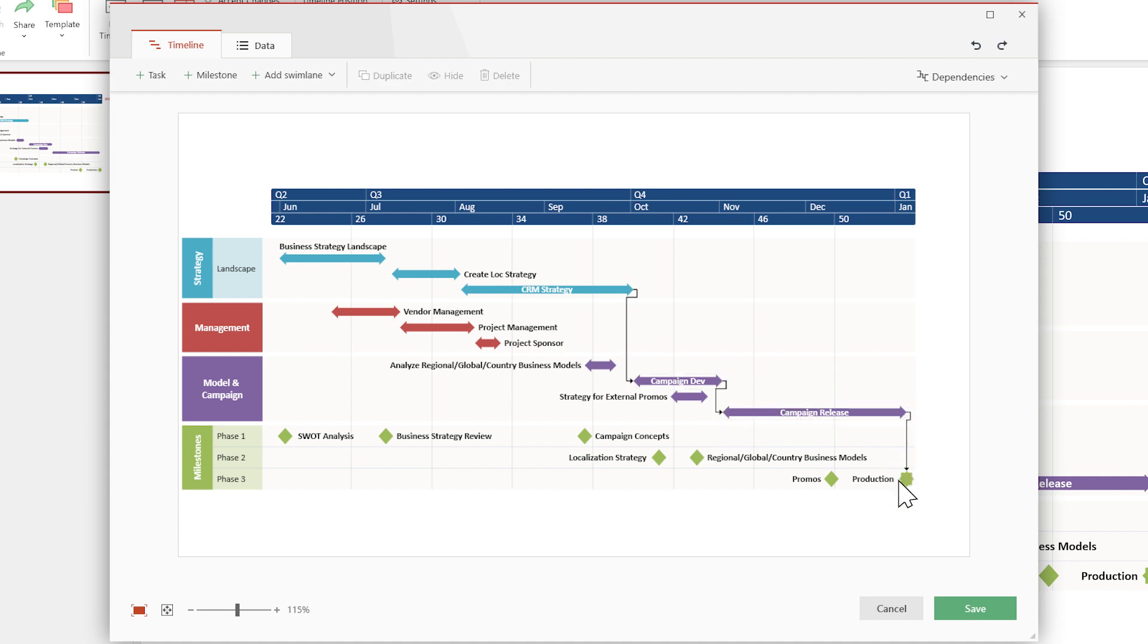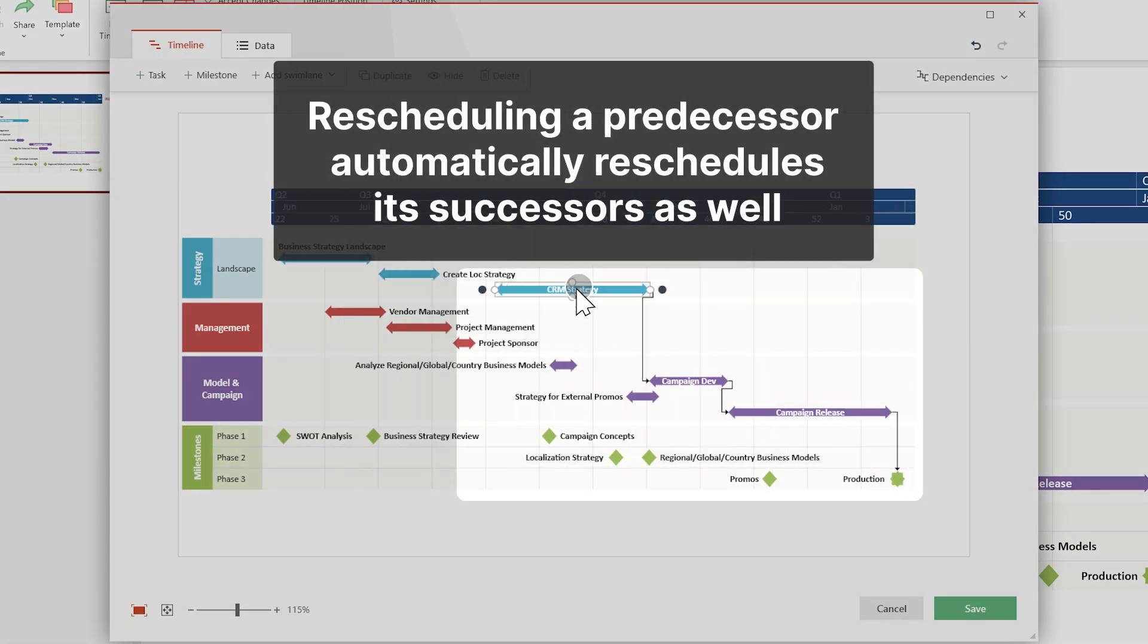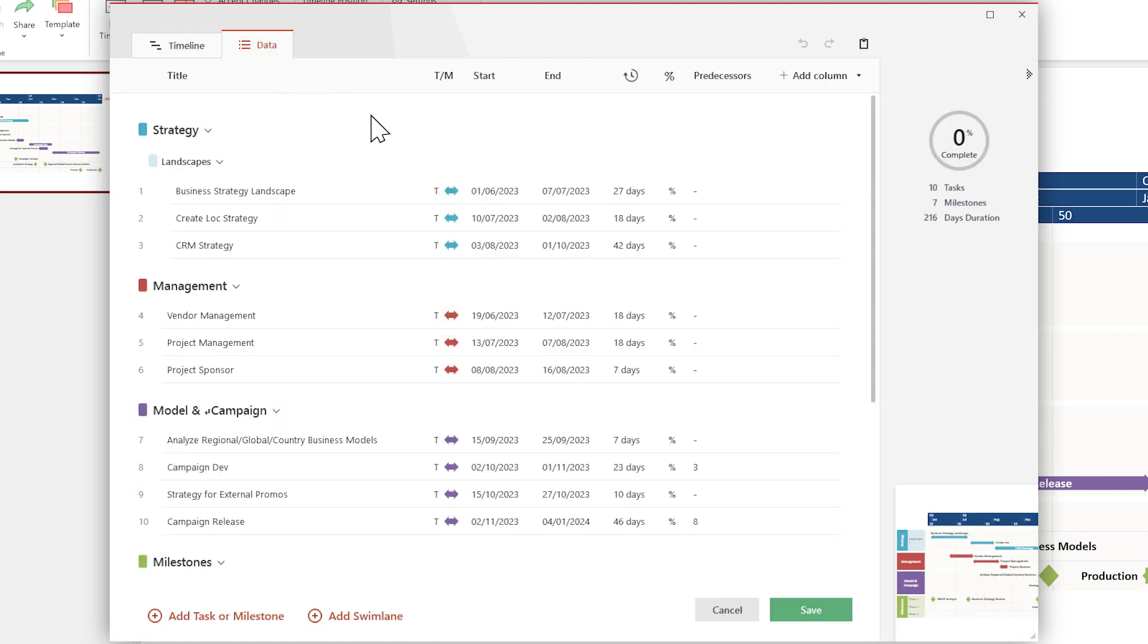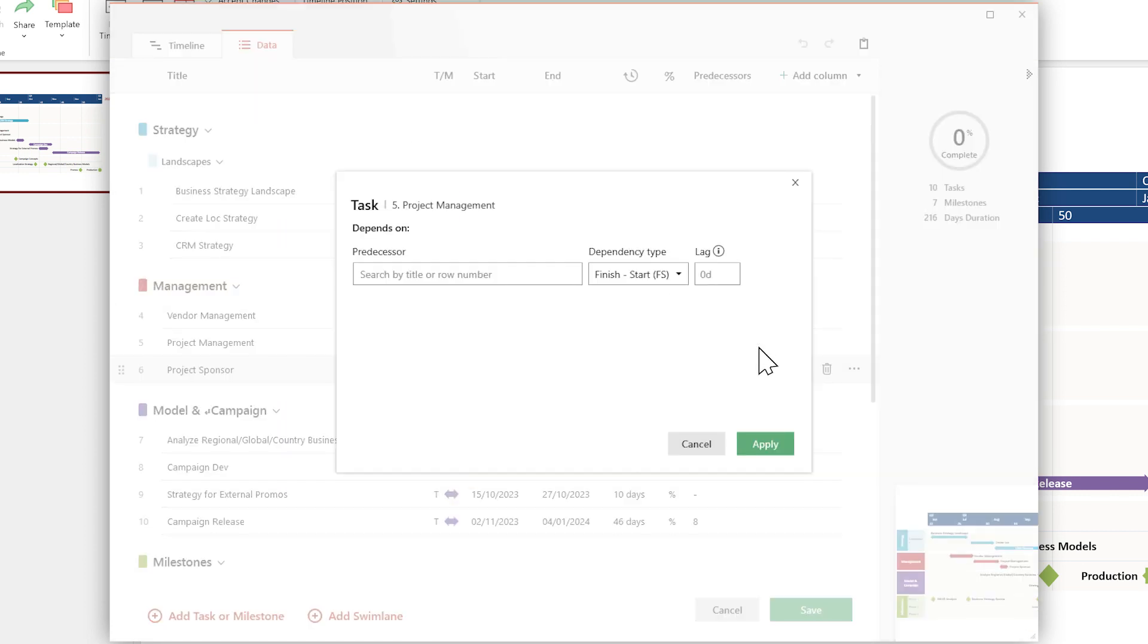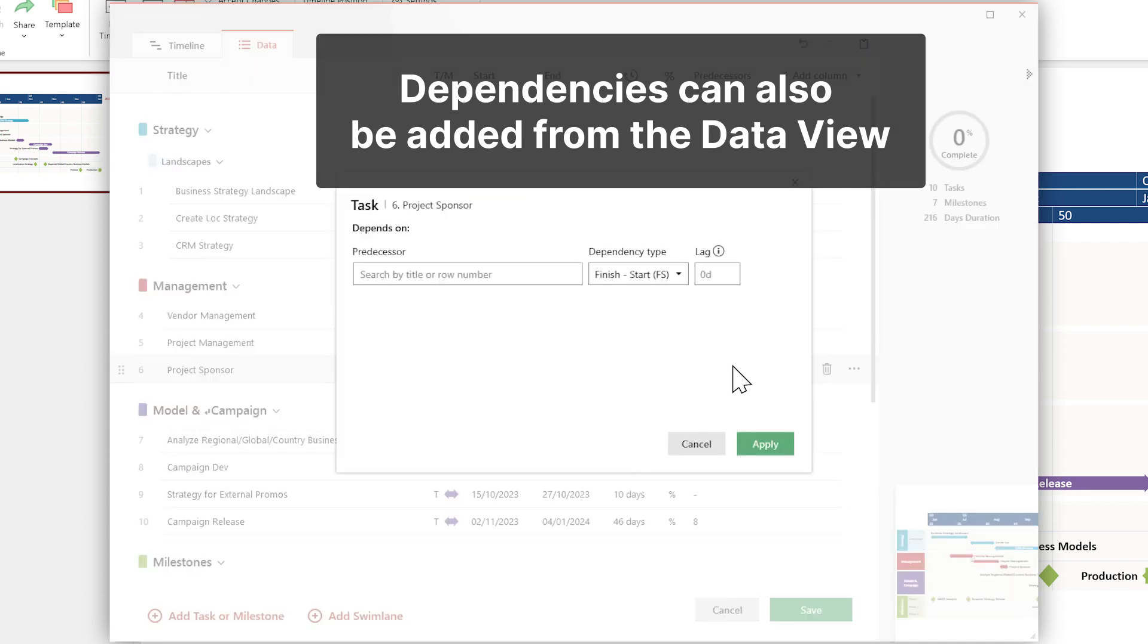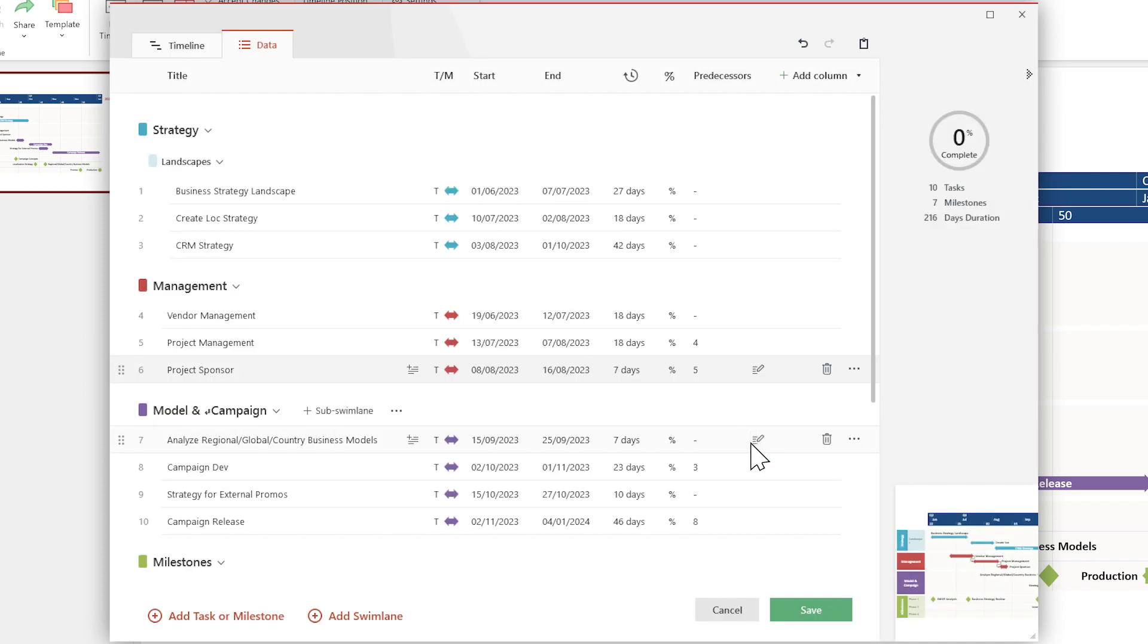Once two items are linked, rescheduling a predecessor automatically reschedules its successors as well. Using the timeline view is the most intuitive way to add dependencies, but you can also do it in the data view. Check out our support article on dependencies for more details on this.